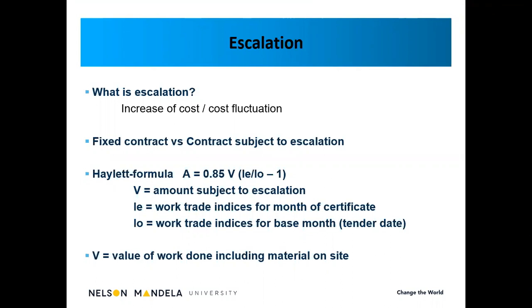There's going to be oil and fuel increases. There's a labor wage increase during the construction period. So the escalation calculations will most probably cover that increase in cost. We also need to ask ourselves the question, is the contract fixed or is it subject to escalation?